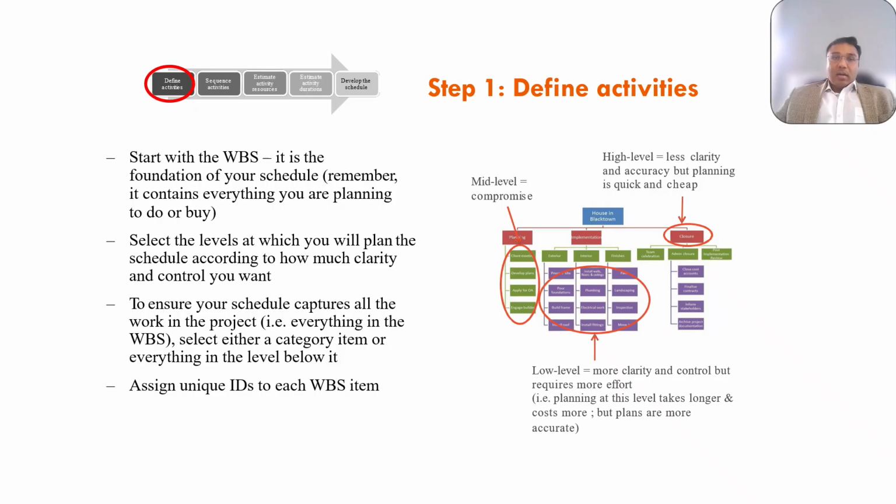What we are discussing here are the actual actions to be taken by an individual or group that can be measured to determine the current state objectively. It is imperative that the work defined here is something that can be measured. Once work packages, activities, and tasks are defined, it's good practice to assign unique IDs to each WBS item.